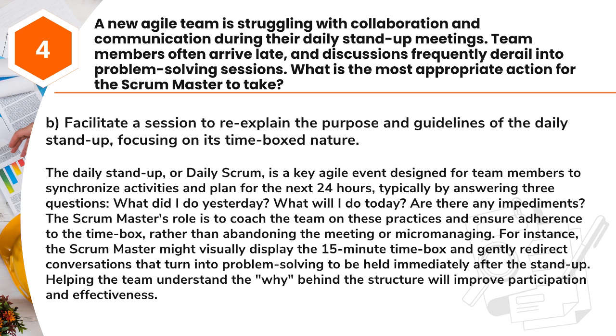Answer: B. Facilitate a session to re-explain the purpose and guidelines of the daily stand-up, focusing on its time-boxed nature. The daily stand-up, or daily scrum, is a key Agile event designed for team members to synchronize activities and plan for the next 24 hours, typically by answering 3 questions.